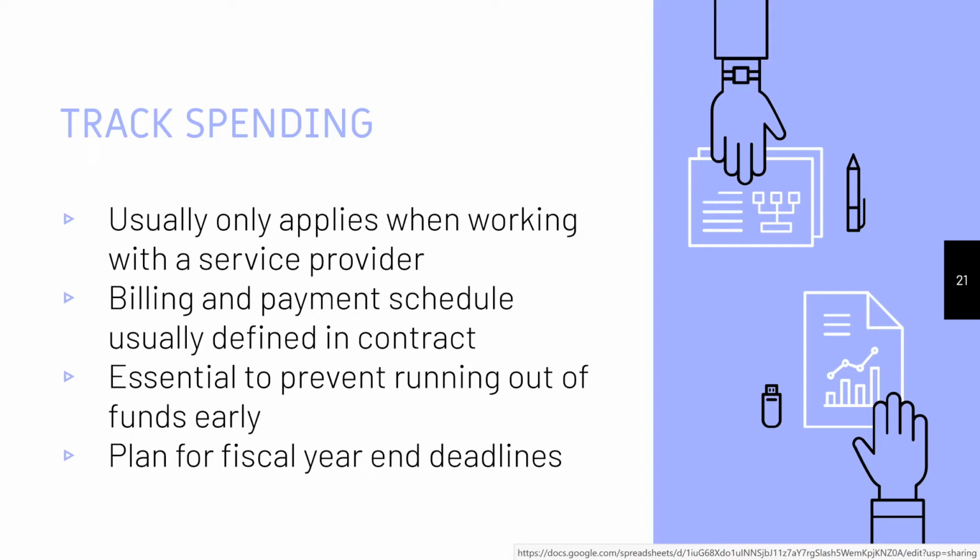So the work increases at the end of the fiscal year for finance office staff. That means that they define deadlines that are not March 31st. They're more like March 10th, something of that nature. And so you've got to keep those in mind.